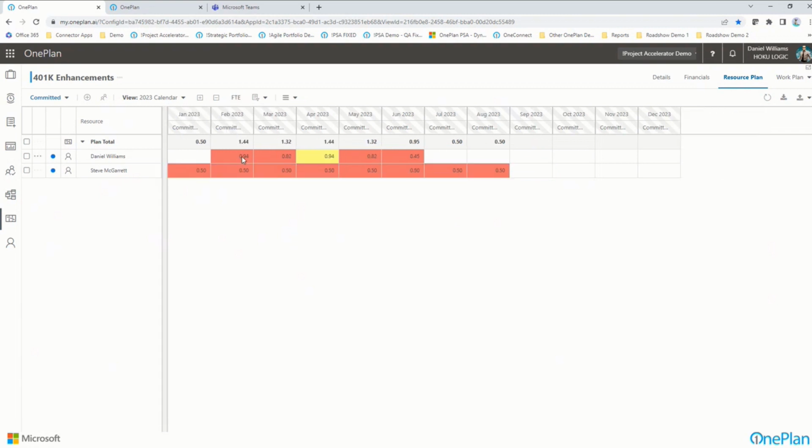And I can see that we have red here, and it's not because they're red within this particular project. Notice that I only have him here 94, or 82% of his time, on this project specifically, but notice he has other pieces of work that are associated with him that are giving him an over allocation in general. So it always has its eye on the other projects or other work efforts that are going on within the mix.